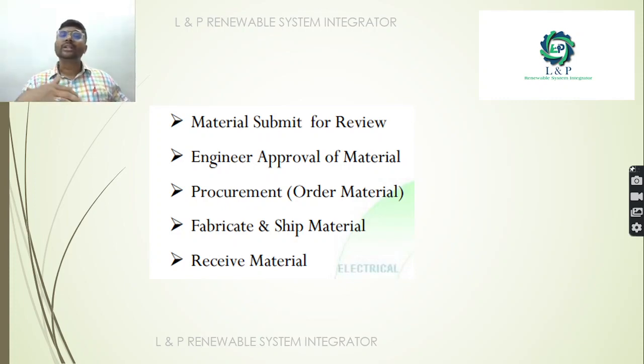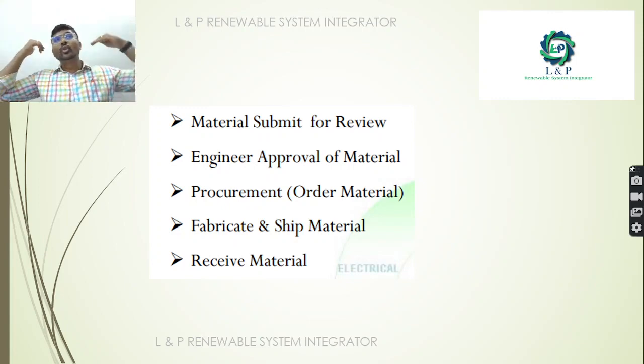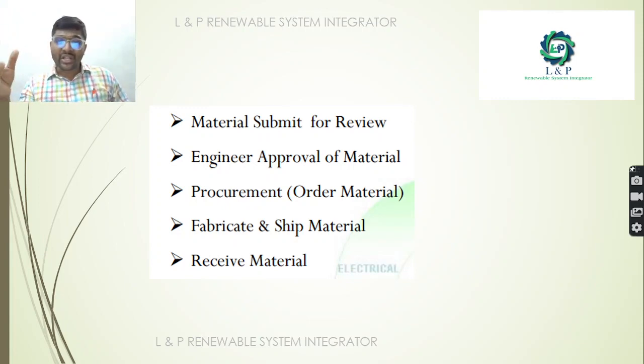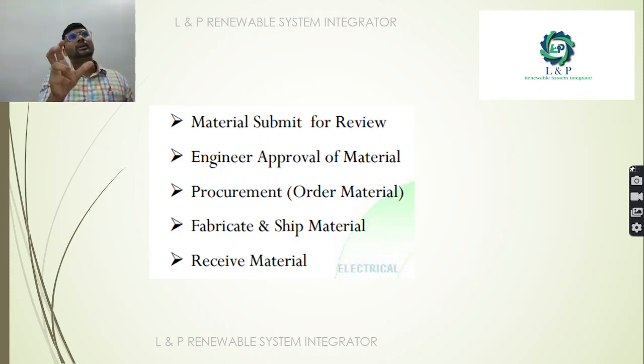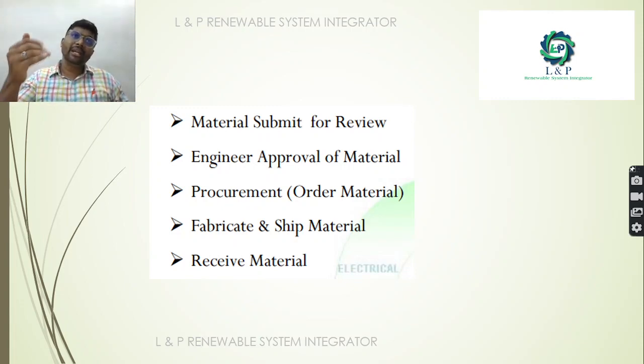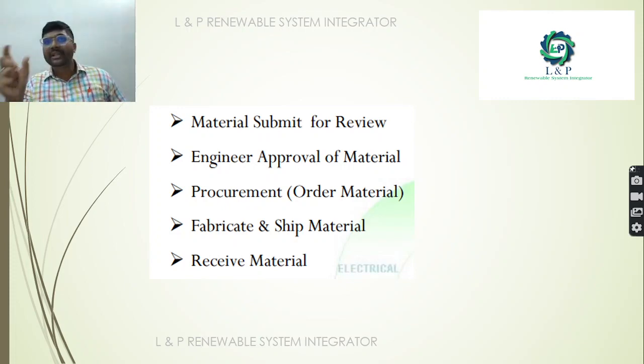Then once all the material submittals and engineering drawings get approved, you need to send them to the manufacturer who is fabricating it, and you need to keep following up with them. Most importantly, they need to ship the material at the right time in order for the material to reach the site at the right time.